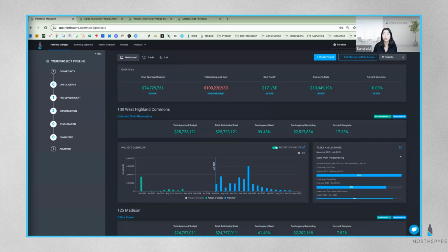Global management consulting firm McKinsey has released reports every few years reviewing productivity growth across various industries. And what they've discovered is that every single time, real estate development and construction has seen almost no productivity growth over the last 50 years. This has resulted in another outcome, McKinsey observed, which is that 3/4 of projects end up over budget. And this is partly because real estate development projects are often longer than the tenure of staffing on those projects, meaning knowledge is lost with every transition and data is stored in disparate spreadsheets that are difficult to reconcile and tally after the fact to get useful learnings.